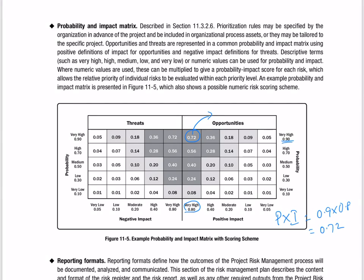If you can capture that opportunity, you can benefit from it. Similarly, the probability impact for a very high negative risk — the threat — has a probability of 0.9 and a negative impact of 0.8, which also gives you a very high threat. So probability and impact of risk are multiplied and you get the risk score — the score of the risk is the product of P times I.